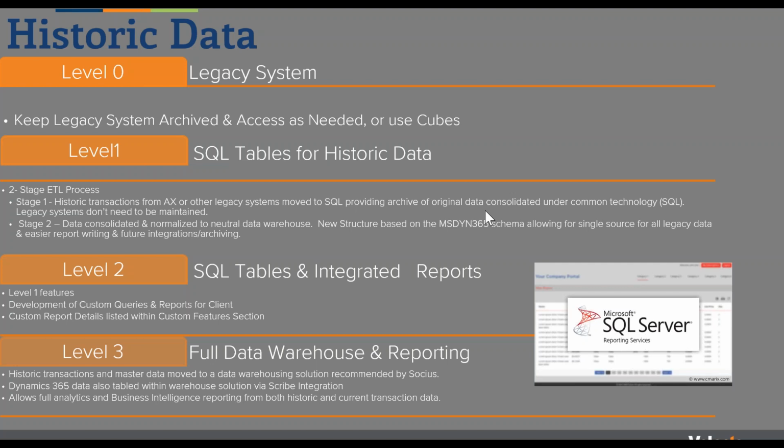We do not typically bring in transactional historic data, so we don't typically bring in posted sales orders, posted purchases, posted inventory transactions into the new system. We choose not to do that because we just don't want to gum up your new system with old data and charge you to data convert legacy transactions. So we do have several options that we provide.